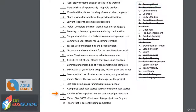Number of story points completed per iteration — this is the team's velocity. This is how many story points they're actually able to get through in design, solution, test, and have ready for release at the end of that sprint. This helps you plan your future sprints when you have an understanding of what your velocity has been on previous sprints.